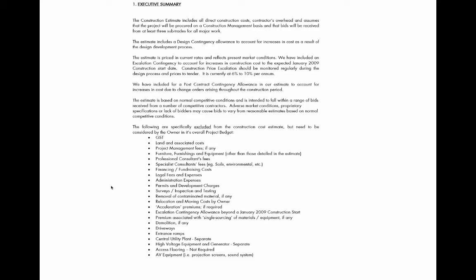if the function of a building is based on, for example, a school or a performance space, you don't include that at all? No, actually, oftentimes the audiovisual consultants say don't carry those as costs. If they're bid later in the project and you carry a separate allowance for them, you might get them for a better value than carrying them and costing them now. So typically you would provide all the conduit for everything, so you just have empty conduit. And so the mechanic would ask the cost consultant to carry the numbers for the empty conduit, and the builder would carry the numbers for it as well.